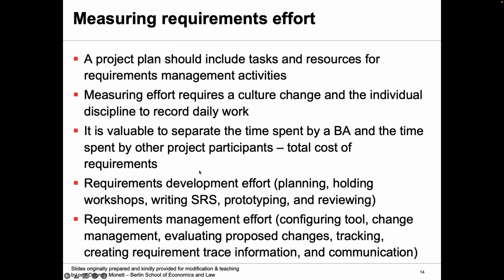Okay, so measuring the requirement effort also involves separating the time that you are spending on managing the requirement, because that is going to give you a good idea of what the total cost of that requirement is. So something at the implementation phase that you find needs rework will obviously carry a high cost to your project, rather than something that you have managed in the initial phases of your requirement.